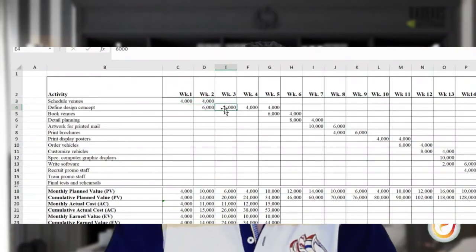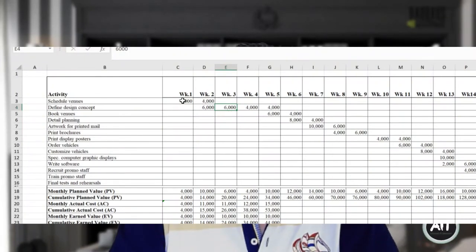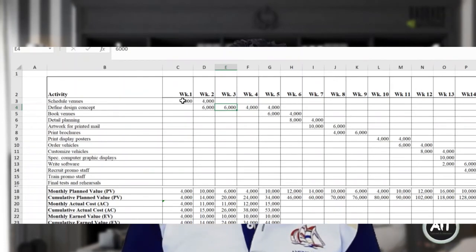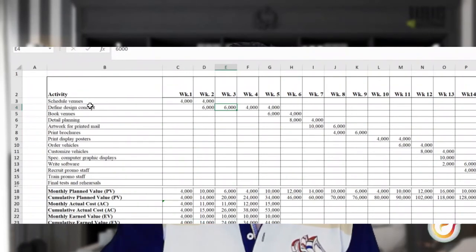You have to work out the number of people, multiply the number of people that are used in week 1. So there's only 2 or 3 people from memory working in week 1. They're working a 40-hour week and they are paid at 35 euros per hour. So do it that way and follow that sequence.